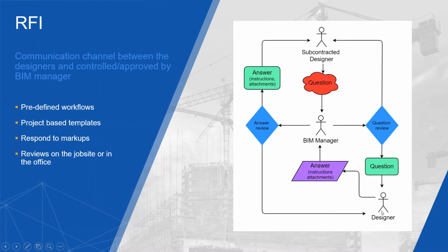And again, the designer will answer the question, or put some instructions, or some attachment. And again, the BIM manager is the hub, and if he is satisfied with the answer after evaluating it, he will send the answer to the subcontractor. If he is not happy, he will send it back to the designer, who may have to put in more details.